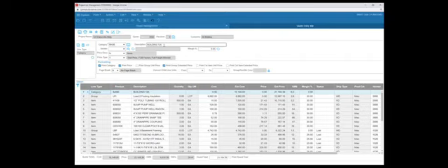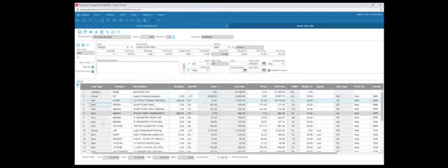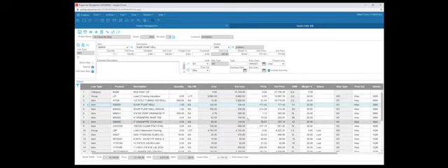So going back to my original thought, the category is the building, or the lump, maybe it's the base bid or the alternate bid. So it breaks it down. This is the top tier, and then groups become like product groups. In this case, it's going to be the load of the 2-footing insulation, right? And then we have the items that are inside that group. Each one of them has its own item number and its own information, and it's pretty easy to just start typing in what you want or adding what you want.